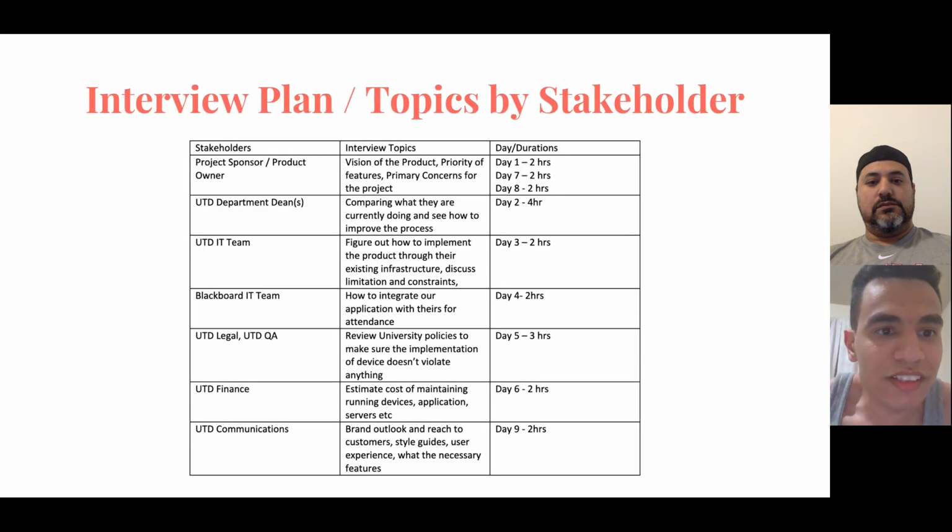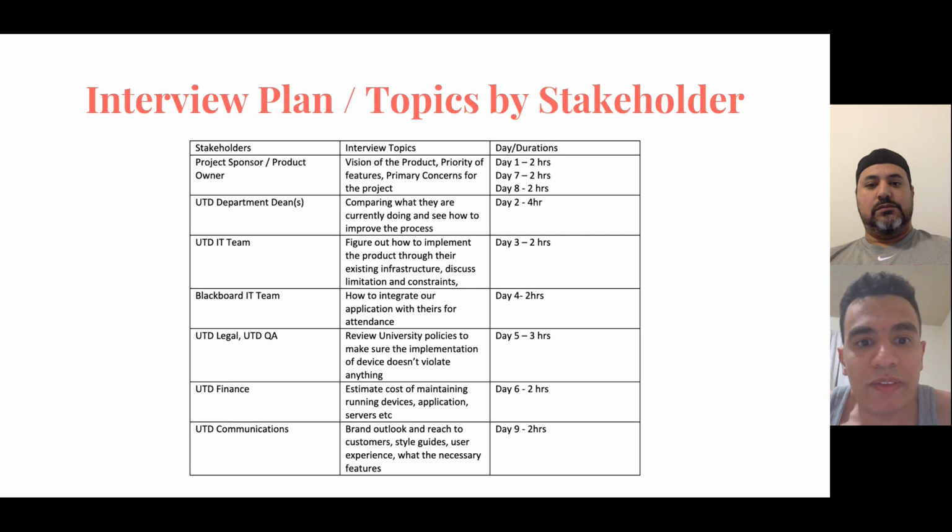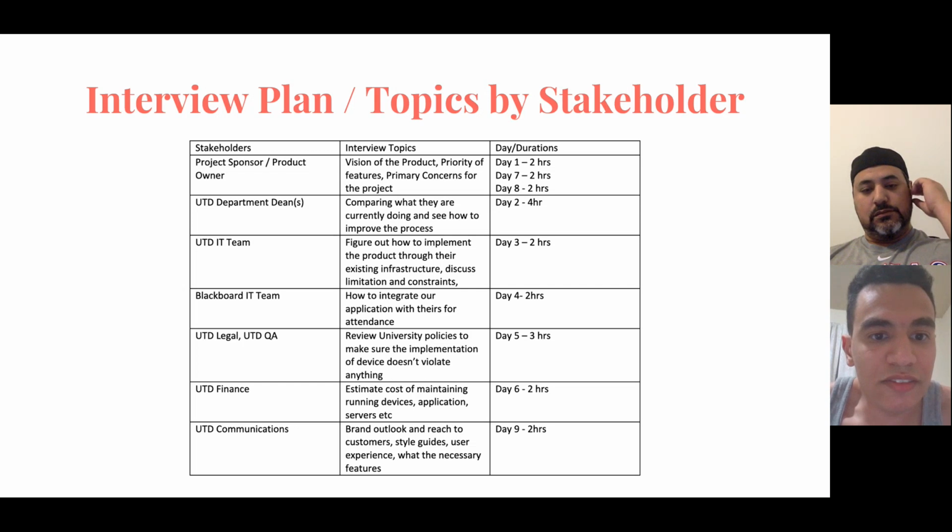So, interview plans. We have the stakeholder interview topics, days, and duration. The project sponsor and product owner: the vision of the product, priority of the features, and primary concerns for the project. It will take 1 day, 2 hours. The UTD departments: comparing what they are currently doing and seeing how to improve it. Day 2, 4 hours. The UTD IT team: figuring out how to implement the product through their existing infrastructure and discussing limitations and constraints.